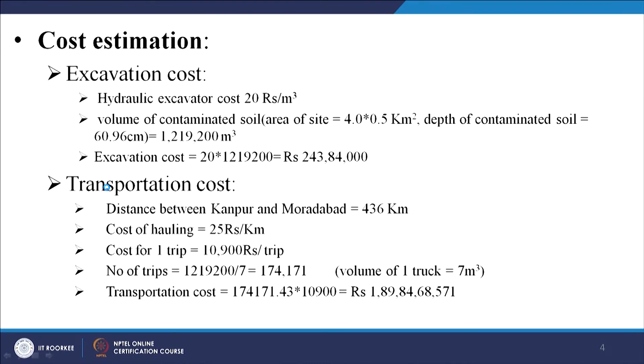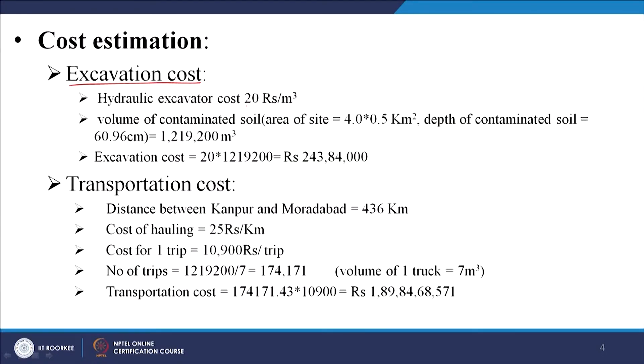Let us look at the cost estimation. For excavation, the hydraulic excavator cost is around 20 rupees per cubic metre. The volume of contaminated soil is based on the area - the length, width, and a depth of 2 feet - giving a particular number of cubic metres of soil. The excavation cost at this rate comes to 2,43,84,000 rupees just for excavating the soil. This may be a conservative estimate as perhaps not the entire 0.5 kilometre width or full 2 feet depth is contaminated, but even if you decrease this cost by two or three times, it is still considerable.